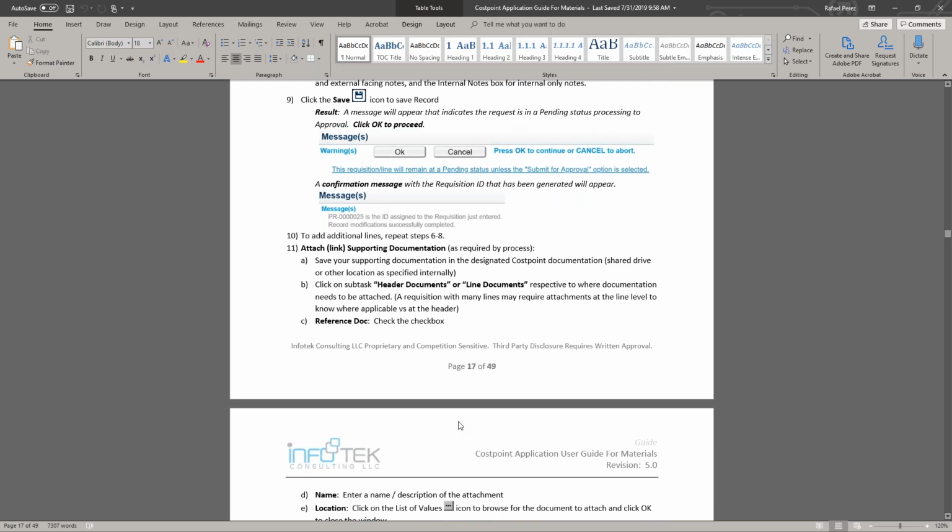So part of our process is that each purchase requester, because they're using government money, is required to use government terms and assure price reasonableness. So they have to be able to do that, and at a certain value, they have to provide three different quotes, or write out a narrative on why they picked this one vendor because nobody else can produce it. So that kind of documentation, the quotes, and actually in every case, whenever we get a quote from a vendor, K has to see that quote.